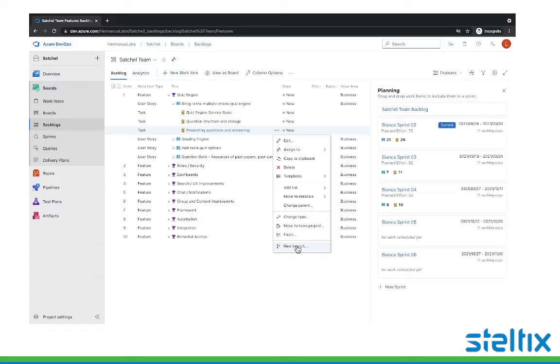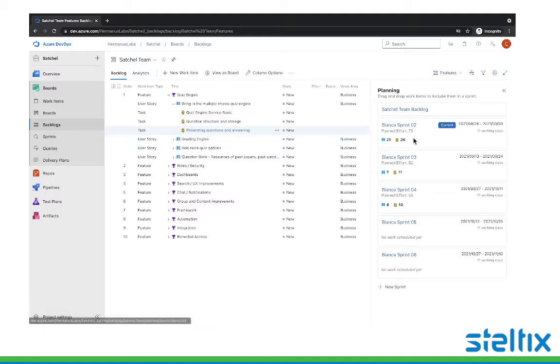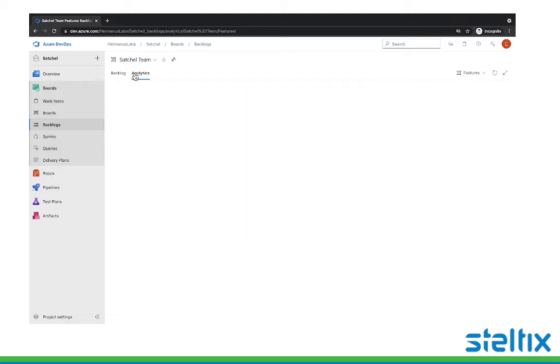If you are using sprints like we are, on the right-hand side here you get a bit of planning information where you can see how many tasks, how many stories are in each of these sprints. We haven't rated these stories for complexity yet, but once we give them a number rating, then we can also see here how much development capacity will be required to execute all the tasks that are in that sprint. And yeah, this is basically the setup. The more you have set up in here, the more you can see on the reporting side.